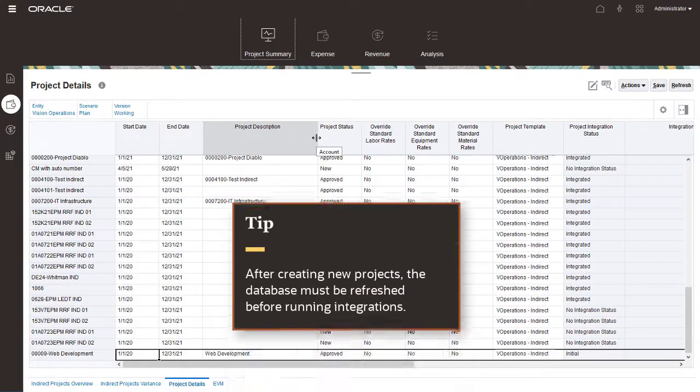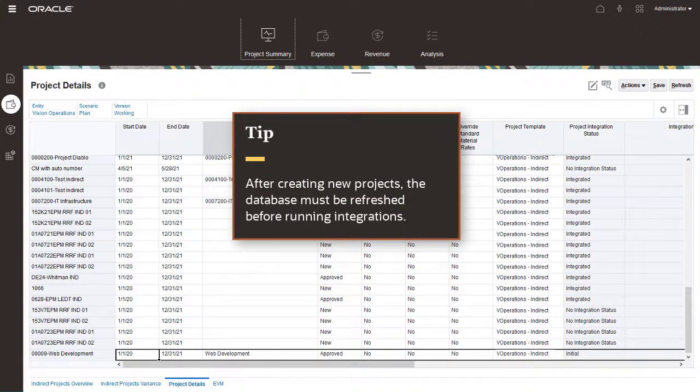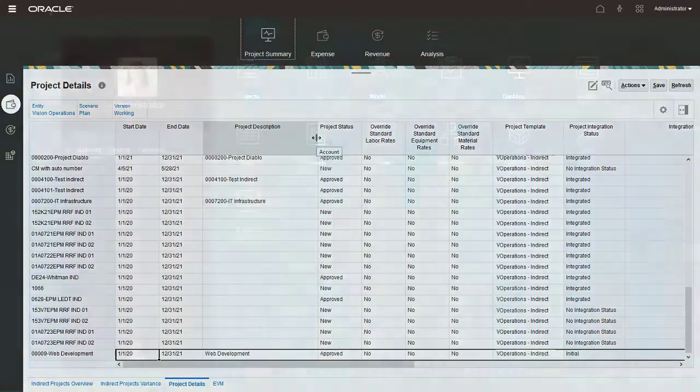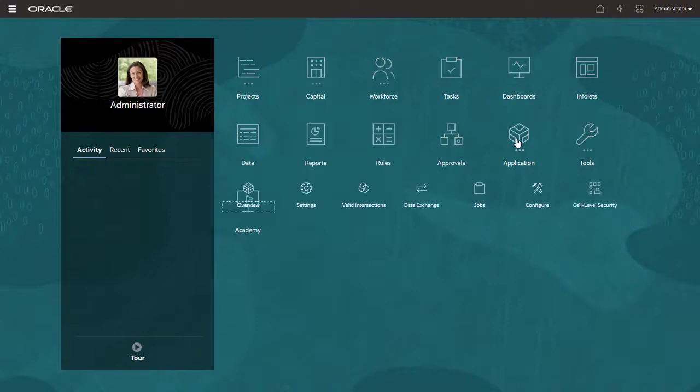After creating new projects, the database must be refreshed before running Integrations. I've already refreshed the database. Now let's integrate approved projects and project budgets with Project Management.